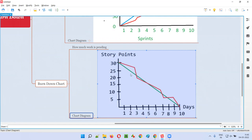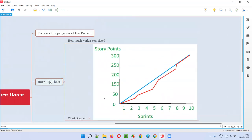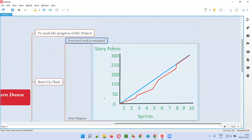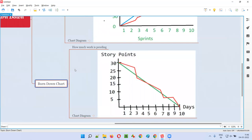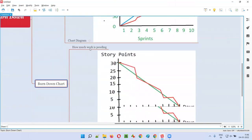When each day is complete, how much work is still pending? For example, if you see here, there are around 27 story points pending after three days — that much amount of work is still pending. So that is what the burn down chart shows, and that is what the burn up chart shows: burn up shows how much work is completed, burn down helps you track how much work is still pending.